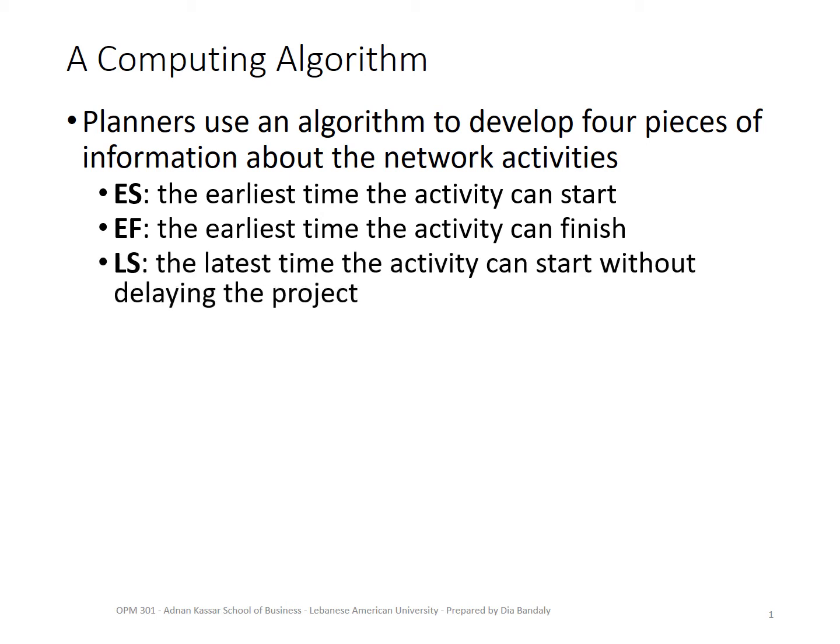We have the latest start. What's the latest start? We already defined the earliest start, but we also can allow an activity to start at a later time, not at the ES, but on condition that the project will not be delayed.